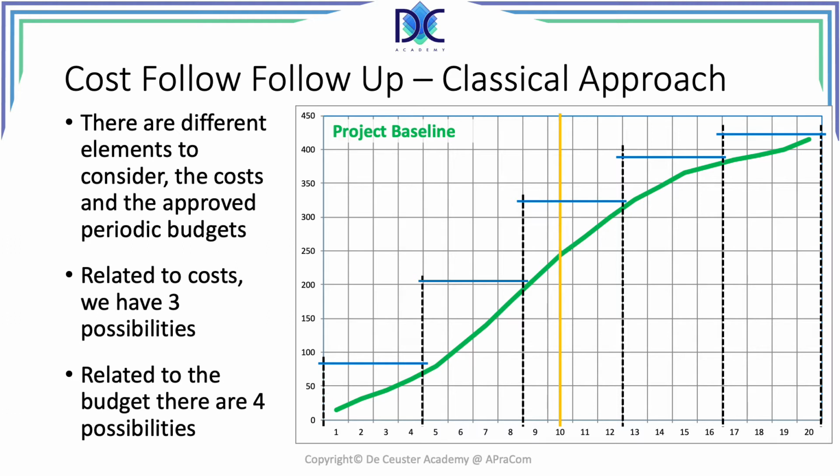Now let's have a look with the classical approach. When we have a report, we are just looking at the cost. And what we see here, this first case, we are below or on the estimate. In this case, below. The other one, we are on the estimate. And typically, this is something which is expected to be positive. And the people are optimistic because they're below the cost. Practical experience has shown that basically this is not always the case.